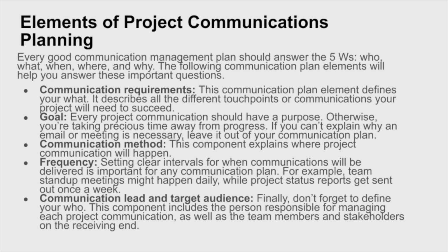Communication frequency comes in. How often do you want to communicate? We need to set clear goals of the intervals, and that would give us clear expectations of what people should expect. So, for example, team stand-up meetings might happen daily, whereas written status reports could happen weekly or even bi-weekly. Communication also needs to be targeted. Who needs to receive this information? This component includes the person responsible for managing each project communication, as well as who receives it.